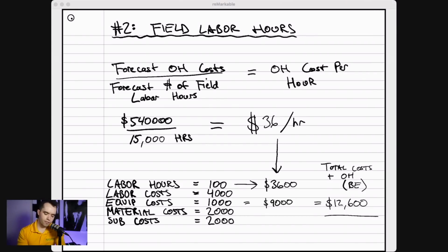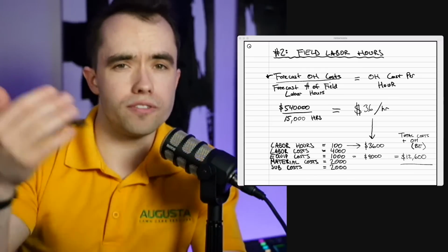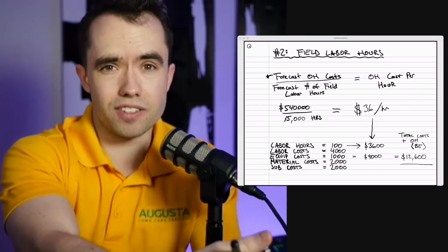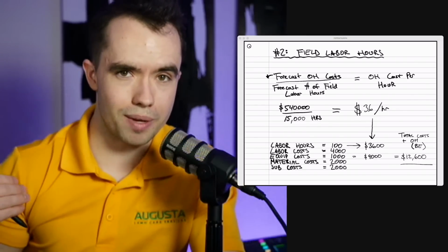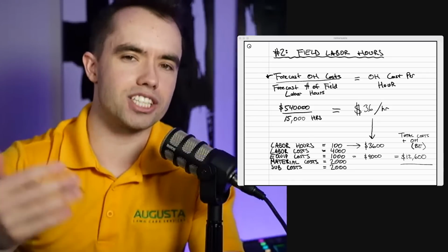First and foremost, you're going to forecast, just like we did before, your overhead costs. Again, usually you want to use historical data. And this is the tricky part, I feel, is most people mess up on determining what is considered overhead. I see a lot of people not including fuel, not including other things that they're writing off as expenses for the business, but they don't ever account for them as overhead. And so they end up not charging enough on overhead recovery to actually make a profit.